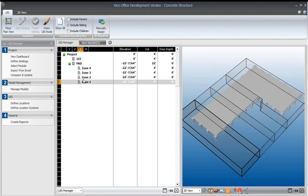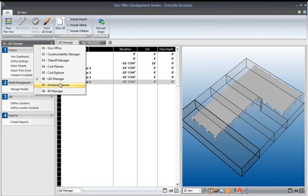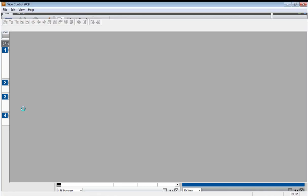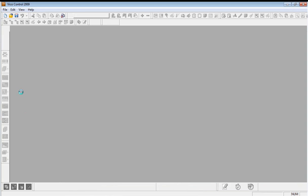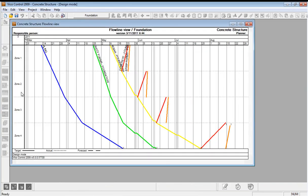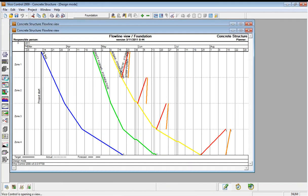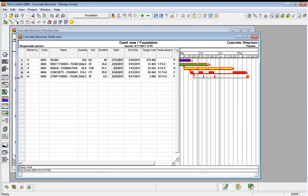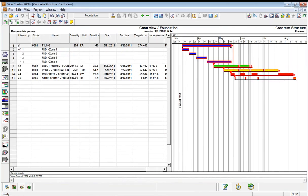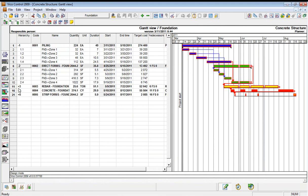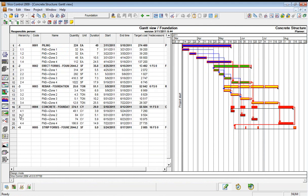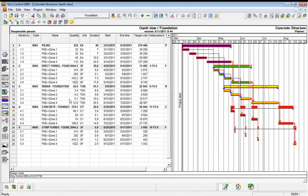Once we've defined those locations, let's go and see the Gantt chart that we had before. If we view the Gantt chart view, we can see that now when we unroll these tasks, there are four parts underneath because there are four zones that we've just created.